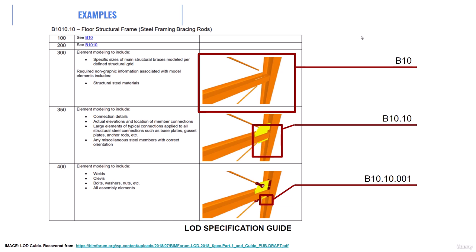But the one I personally usually adopt is level of development with these initials, which can be categorized into LOD 100, 200, 300, 350 and 400, which is the maximum, where we get a completely constructive project with all the details. An LOD of 100 is used for conceptual modeling.